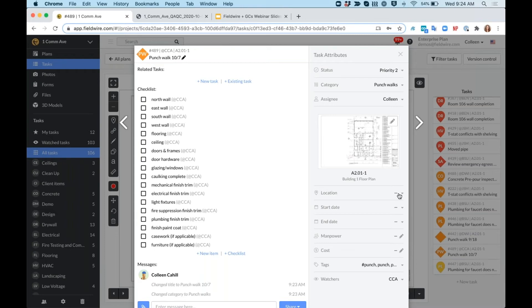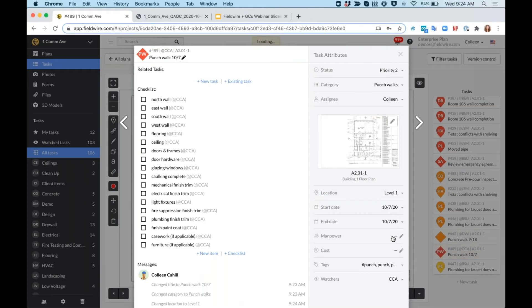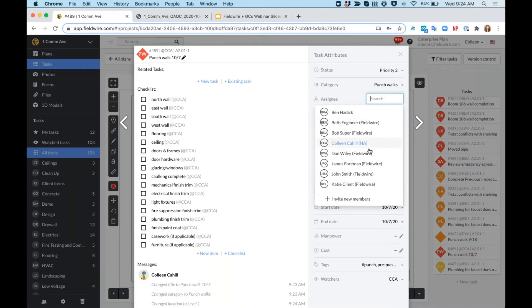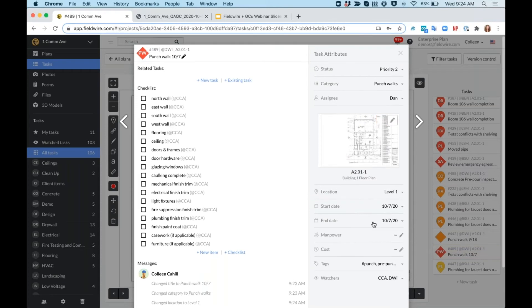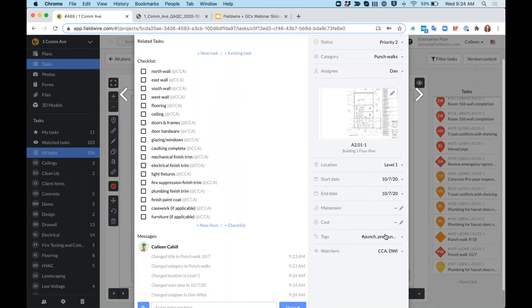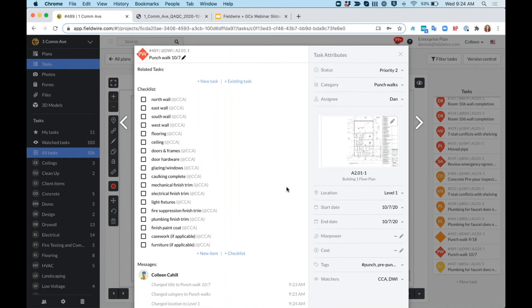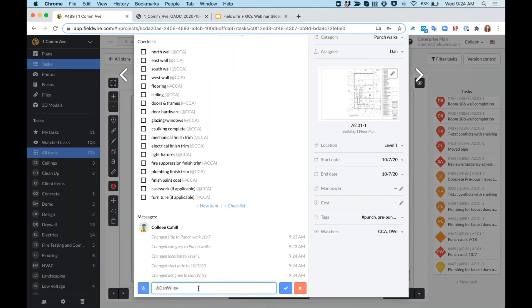I can add a location here as well since this is level one. I'll add a start and end date as today so my team knows that they need to complete it today. I'll assign this to Dan once again so he gets that notification and I can enter cost and manpower if that is applicable as well. I'll then message Dan and let him know, client comes tomorrow, please complete this afternoon.